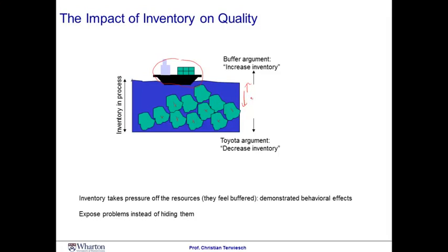We should do this gradually. Instead of taking all the water out of this river at once, step by step, we reduce the water level and expose the most significant rock. Once we've identified the rock, we go after the underlying root cause, we get rid of the rock, and again start lowering the water level. So you notice that this creates a certain paradox.